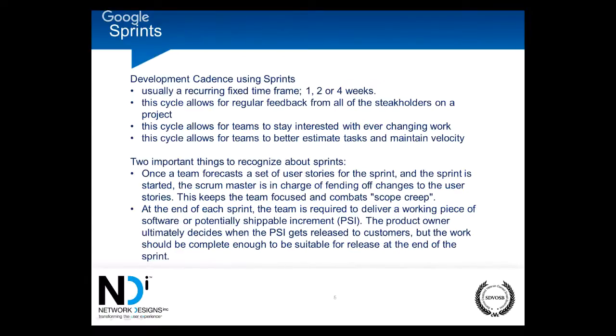If I have 5 tickets that are all 5 hours, that's a total of 25 hours. That's only a little bit more than half a week. So if my sprint is 2 weeks, and that's what we use at NDi, I should be able to accomplish about 30 to 35 hours worth of work, taking into account drive-bys and being late to work for traffic or whatever. We're not going to kill each other. We're going to base it on a 40-hour week with a 35-hour production time.